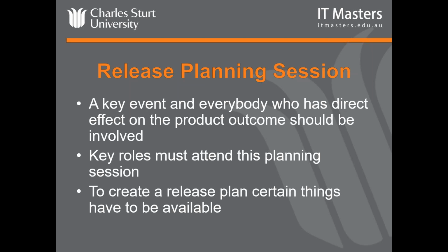They can also assign story points to some form of equivalent measure. For example, one story point equals half an ideal day's work. However, due to the lack of detail at the release planning stage, many teams might not use story points. They might use t-shirt sizes or dogs. Yes, I did say dogs. We could have small, medium, large, t-shirt, Jack Russell, Bulldog, Golden Retriever for release planning. And then they might move on to story points as more details are available.